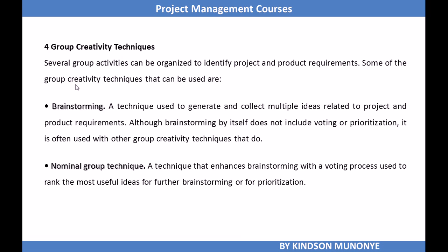Some of them are brainstorming. Brainstorming is used for generating ideas about product or project requirements. And then nominal group technique enhances brainstorming with a voting process used to rank the most useful ideas for further brainstorming or for prioritization.